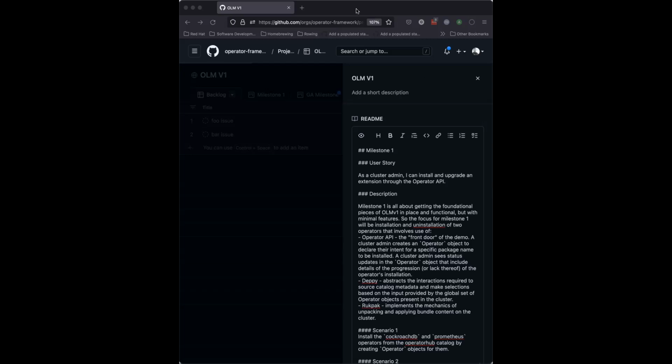And Jesus kind of alluded to this in the chat, but if we just have an issue that says I want to do X, and we say, well, that's not milestone 1, and we just put it in the next milestone because we're not working on that milestone yet, that's probably not the right answer unless we're constantly looking at whether that story is really something we want to do as part of milestone 2. So we should really have a good idea of what the high level milestone scenario should be for the next milestone. We only put issues in there if they are actually going to contribute to the milestone.